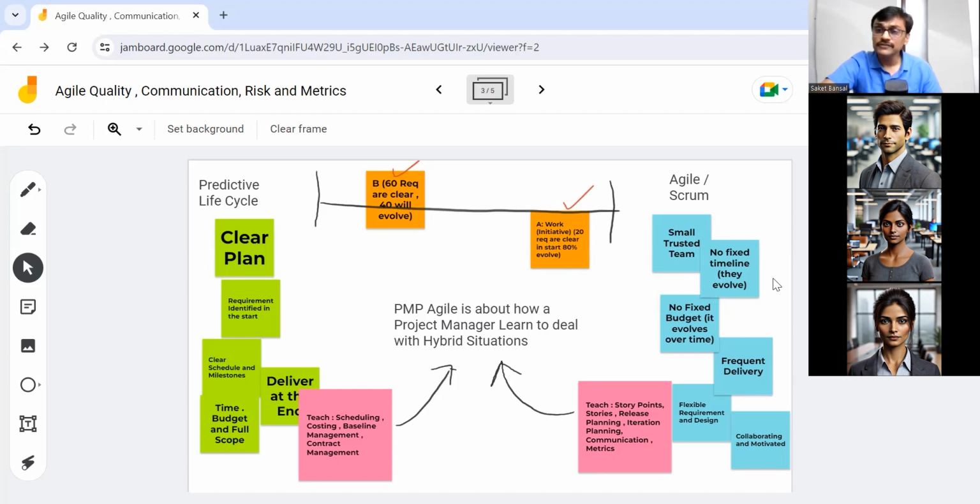Yeah, because see, whenever you have a fixed price, the scope has to be fixed most likely. And wherever you have a customer not frequently engaged, for them it's a clear requirement and they hope for the end result coming in, then you need to have documentation as well. Another thing you need to be very clear about in such a context, the scope baseline should be well documented and signed off. You can say, guys, this is what you will get in 6 months time.